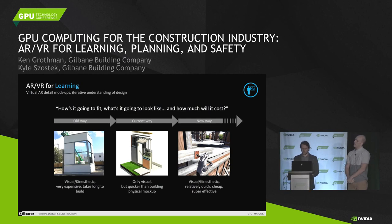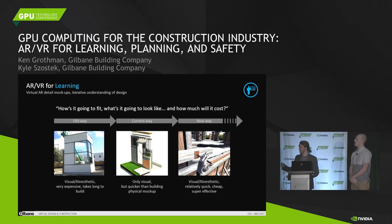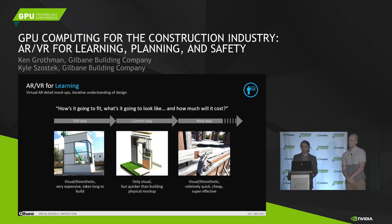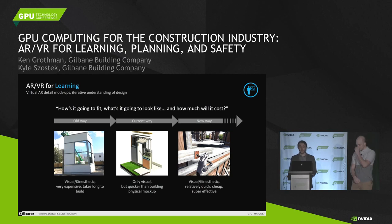This is our first case study. Sometimes before a building is constructed, the owner might request full-scale physical mock-ups — a physical prototype of a detail of a building, like what you see in the left image. They might want to see materials and material transitions or specific details in real life. The old way of doing this is by coordinating teams of trade contractors together, who will ultimately build the building later in the field, to build the physical prototype — which can take weeks or months out of the construction schedule and potentially cost tens or even hundreds of thousands of dollars, depending on the detail.